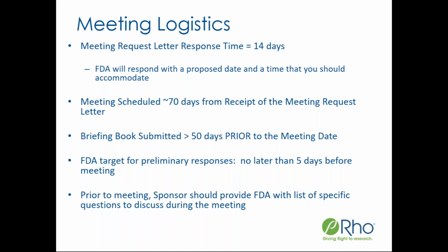So it doesn't give you much time between the moment you send that meeting request letter out the door to when your package is going to be due at FDA if they grant you a date that you have requested in the letter. So you need to make sure, again, I can't emphasize this enough, that that meeting package is ready to go before you even send the letter in asking for the meeting.